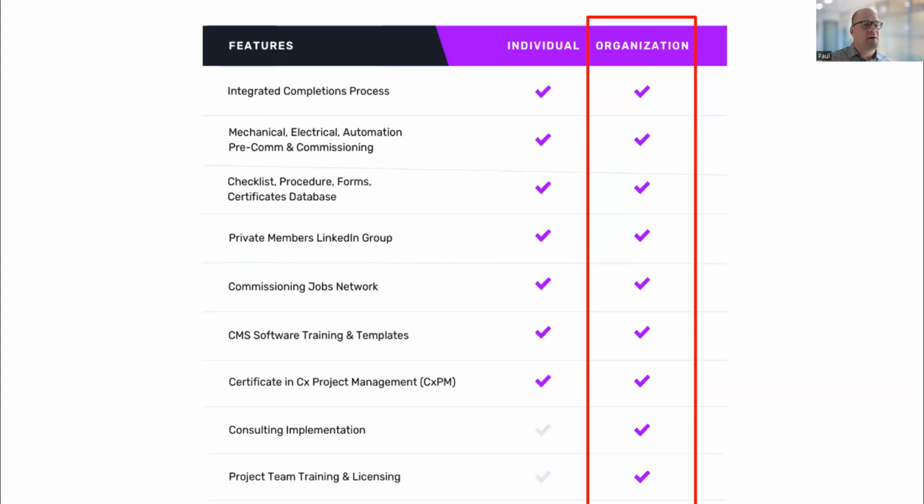There is no software I've found that takes a picture of a P&ID and splits it up for you, because it's always that commissioning expertise that's required in specifically how you want to start up your project. No software is going to tell you how to start up your project. Only the commissioning experts can do that, to define this system first, that system next, depending on your specific project needs. But once you define that, it all goes into software pretty easily. But it has to be divided before the input to the software. Yes and no.